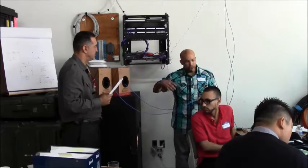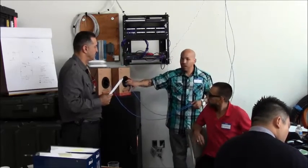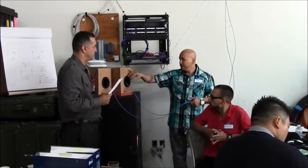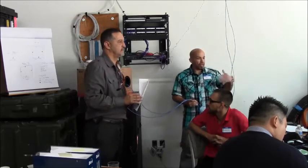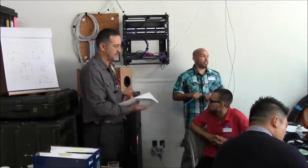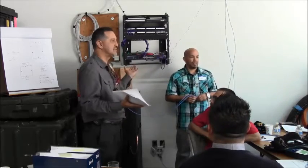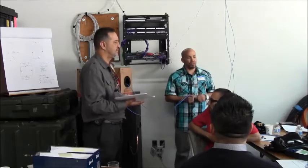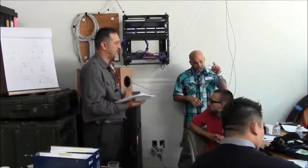So when I'm pulling again, I'll come to my box and I'll ask, how much do I have in my box yet? 288 feet left. Then I'll look at my print and I'll see the next run, because usually prints come with the footages on it too. After 300 feet, you can't run it, that's as far as you can go. You can't exceed 300 feet on any run whatsoever.